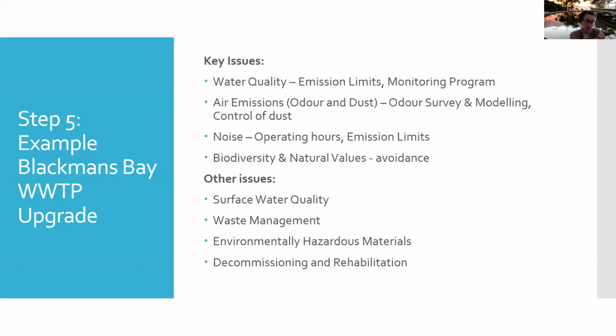So deconstruction or demolition is classed as development under planning law in Tasmania. So if you decide to demolish a house or a structure, you may need a planning permit by the council. Within the council planning framework is mitigation and management of contaminated issues. So them taking away a building may not, it depends. If it's part of the EIA process, we might have considered it as part of the construction process, and then they wouldn't need anything else.